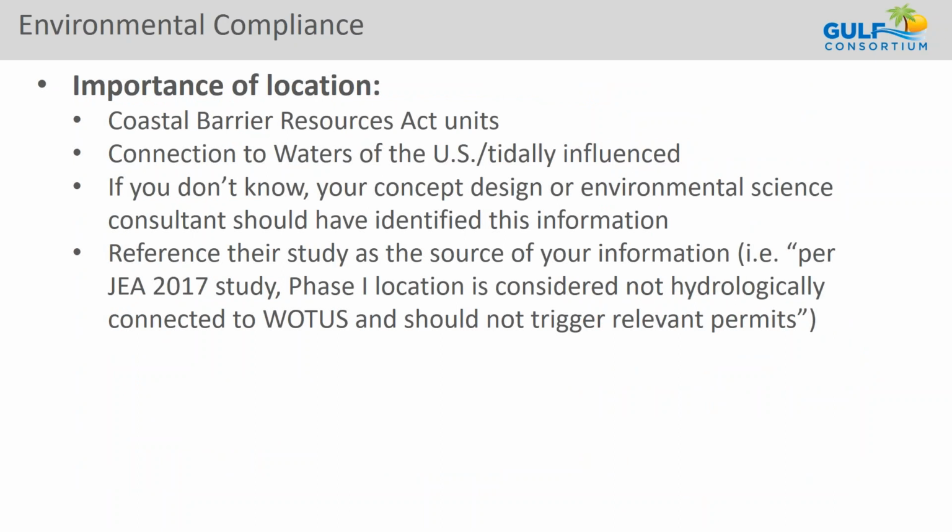So for example, if you're in a Coastal Barrier Resources Act area, we have the spatial data about where those areas are. If you're connected to the waters of the U.S. or in some way tidally influenced, that's going to matter in terms of the type of permit you need and the type of environmental compliance you need to demonstrate.